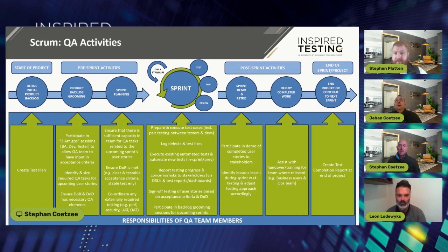And whilst I agree with that in theory, and I think that's the right thing to do, it is not always as simple as that. It is still a "depends" answer. As a hard and fast rule, yes, I absolutely agree. But when it comes to the end of a sprint and that decision, it's for the product owner and business to make that call. I've seen, even if there are critical defects outstanding, but the business needs something because it's month end and they want this functionality now for the next week, they might still just go ahead with it. So it's not the engineering team that will make that call.